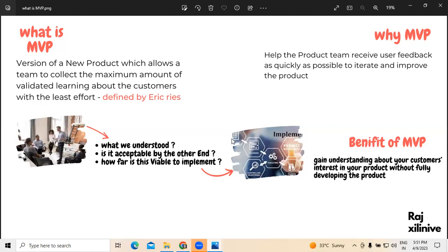What is required? First of all, minimum user experience and user interface design is needed. And whatever products they are selling online, those products have to be classified, categorized, and displayed, and it should be easy for a user to search. That's it. Nothing more than that. This is what we call MVP. Understood now, Archita? Yes. Thank you. MVP, right? So that's the basic.